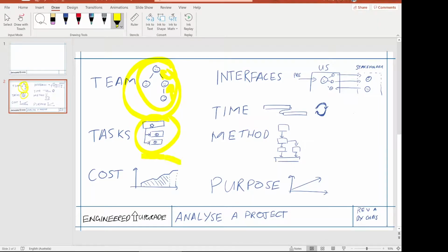So the third thing, after understanding the tasks involved, is to start thinking about the costs of the project. Do we have any budget? Do we have any requirements on how much cost is going to be spent? A lot of my work is consulting projects. So a lot of my costs are just the team salaries and maybe some travel to client offices. But understanding those team salaries, the number of hours the team is spending on a project, is where my analysis of the costs come from.